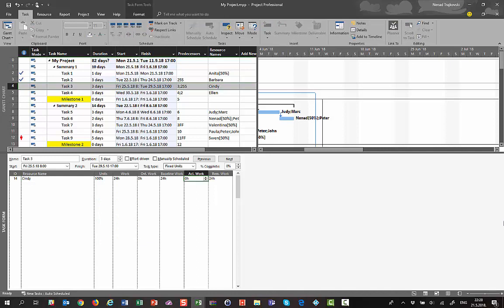Now watch this carefully. For task 3, Cindy should work 24 hours. This is baseline work. Let's say that Cindy worked 8 hours. She started on time and she worked 8 hours, but she needs another 40 hours.